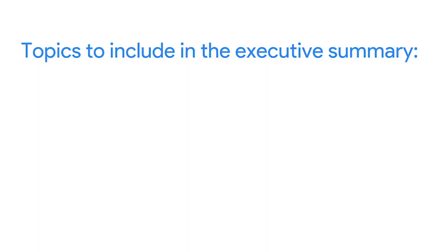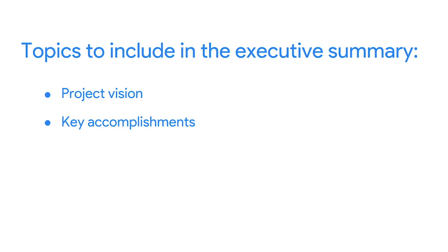You'll want to include elements of the following information: project vision. Here, you'll specify what the purpose of the report was. What need is the project fulfilling? Key accomplishments. This is your opportunity to discuss which activities, tasks, and milestones helped you define success. What are the main highlights in the impact report? Did your project increase profitability? What value did the project add? Talk about those here. Lessons learned. This is where you'll talk about potential improvements. How will you change future processes for the better?